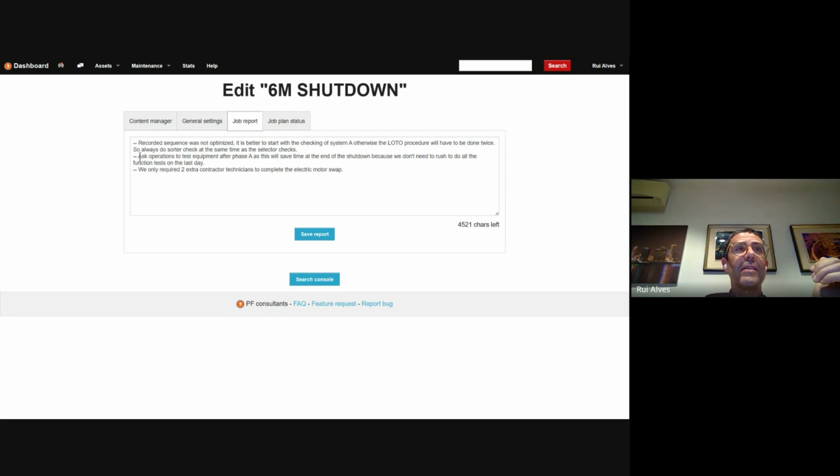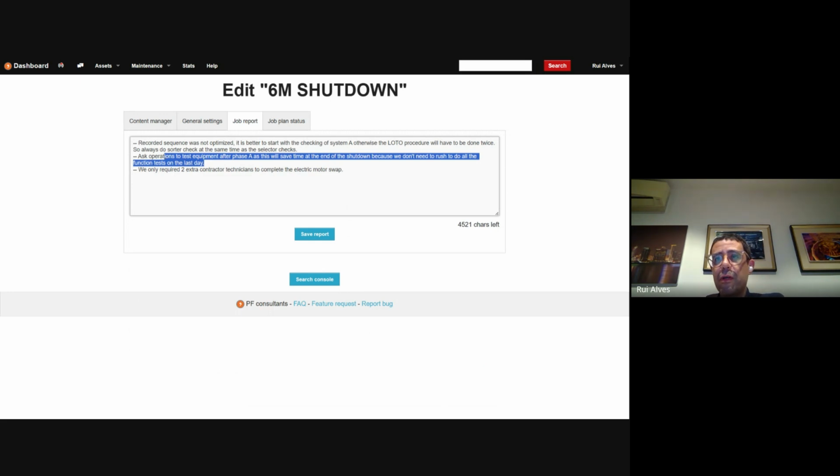As just another example, ask operations to test equipment after phase A. So the milestone that I had in milestone 1, we realized that if you wait for operations to do all the verifications at the very end, then you've got a lot more work and it's a lot more rushed than if you split it into different occasions. You didn't know in the beginning, but now you can tell that you can plan it that way. So you leave that note for your future self, or for the person coming on the next shutdown and planning the next shutdown. These are some hints on how to make it better.